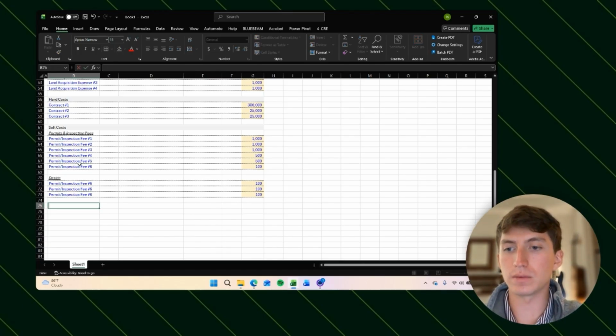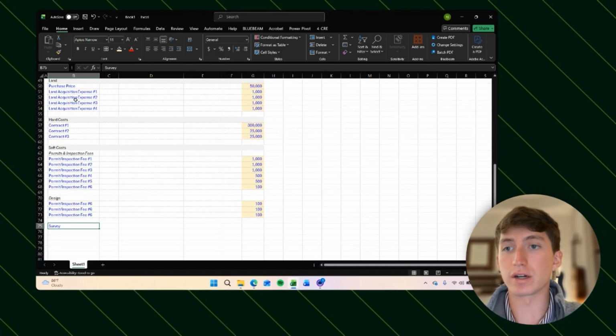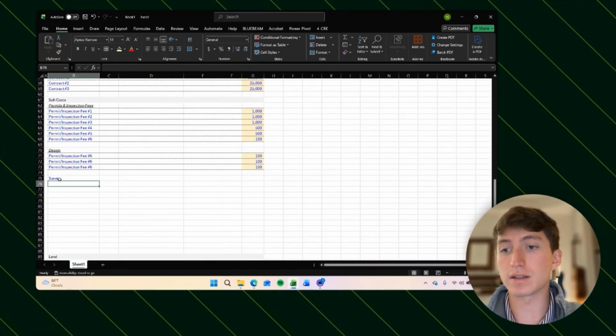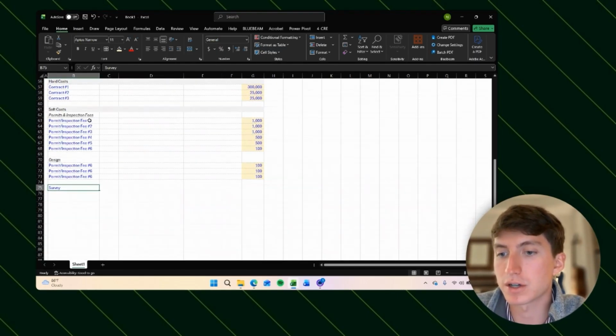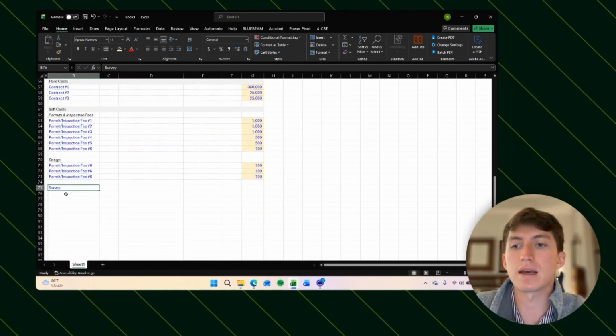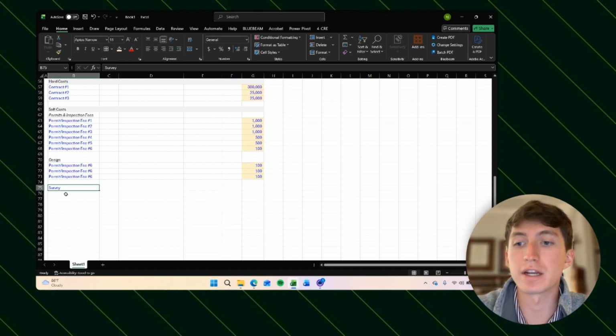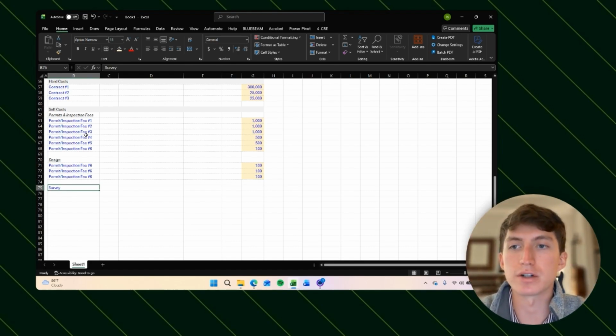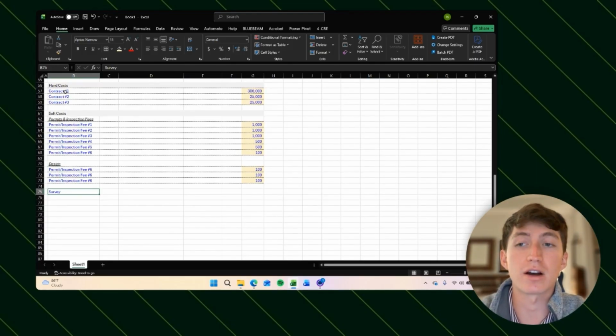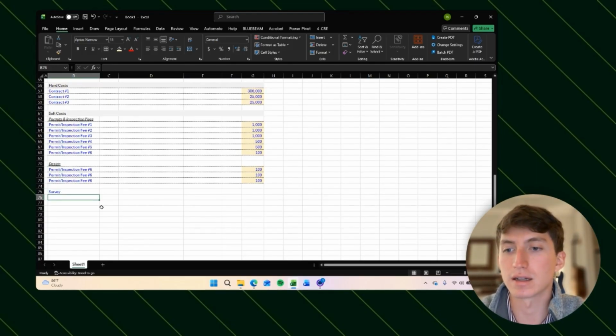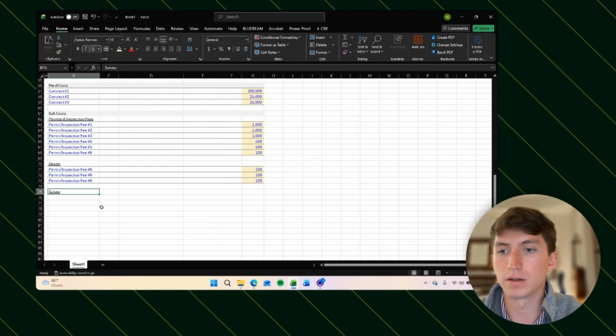So next thing, we have our surveys. You might do a survey during construction, or you may pay for surveys during your land acquisition, but in my county, you have to pay for a survey once your foundation is put in. This wasn't originally included in my contractor's contract, so it had to come out of pocket. Moving forward, this would be in my development budget before I spend any money on the deal, and we'd carry it under the survey line item. Control-Shift-K, I, underwrite, there we go.